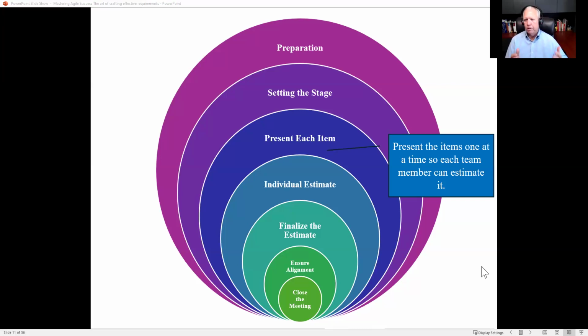In other words, when we finish a 3-week sprint, we should be done with those 15 features and hand them off to the customer. We are time boxed into that 3 weeks. We've got to finish it by that length of time. If I've only done 13 of the 15 features, we hand those 13 off for the customer to be able to see in the demo that we do. But those other two would then go back to the product owner. The product owner decides what they're going to do with those other two features.